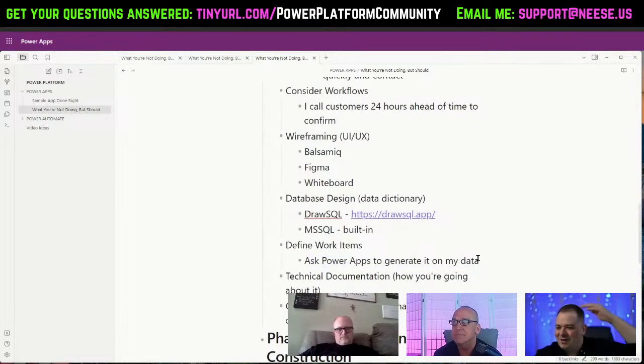you need to have a bullet list item by numbers. A lot of times, as I see this, you'll have bigger topics, sometimes they're called epics. Epics are broken down by stories. Again, I'm using Agile or Scrum methodology here. You'll have all these different terms, and it's like you drill down to the individual item that you can hand off as if it was a little post-it note.